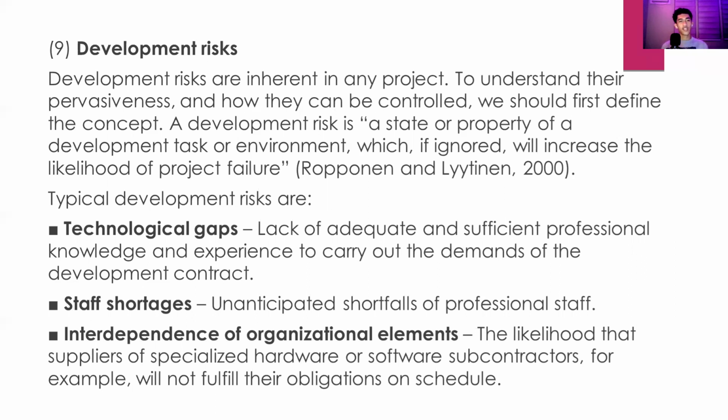So first, the technological gaps. This is the lack of adequate and sufficient professional knowledge and experience to carry out the demands of the development contract. Second is the staff shortages. This is the anticipated shortfalls of professional staff. Third and last is the interdependence of organizational elements. This is the likelihood that suppliers or specialized hardware or software subcontractors, for example, will not fulfill their obligations on schedule.